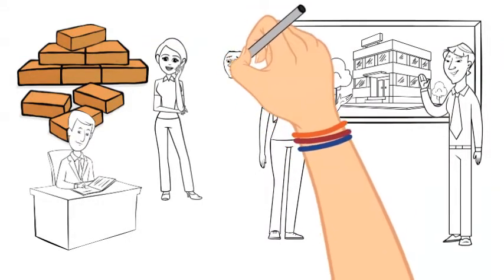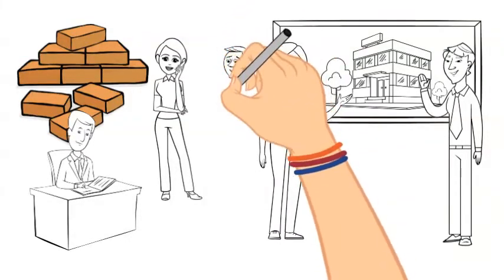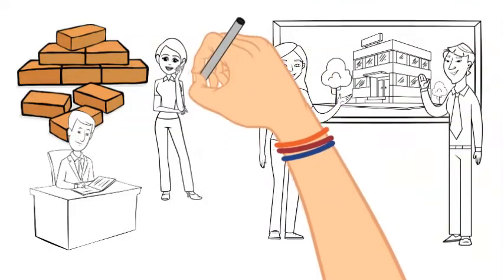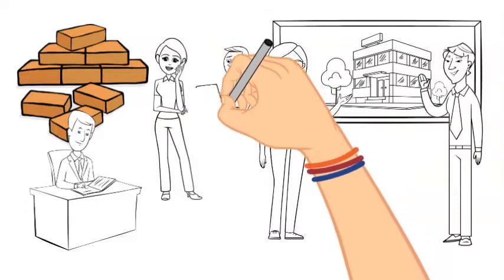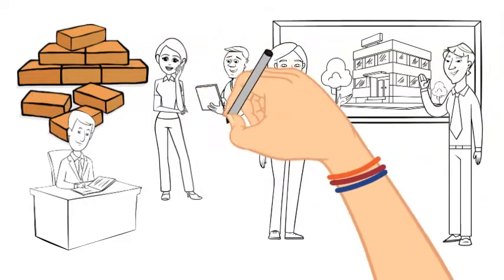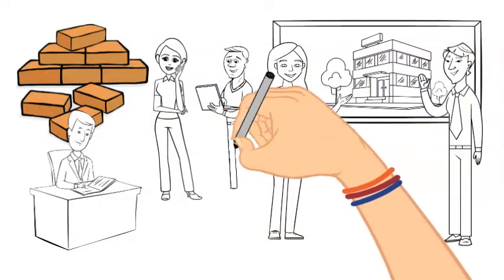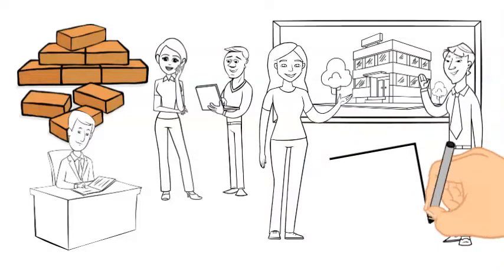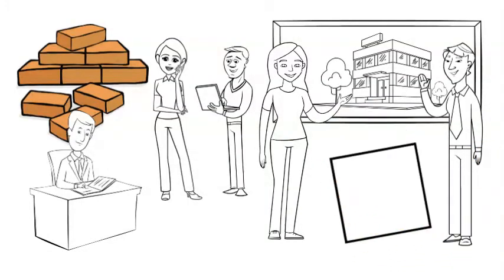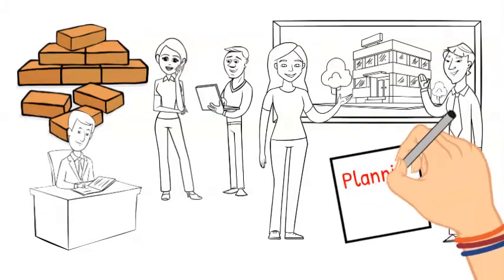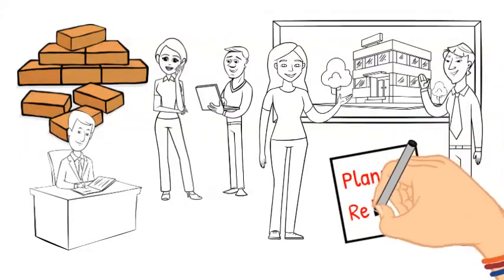Once we have a good idea of the materials we need, we can get the project planner involved. They'll start to produce charts about when these materials are going to arrive. But not just the materials, remember they've got to get the labour on site, they've got to make sure things like scaffolding and tower cranes arrive on time as well. And remember, throughout this process, the local planning authority need to approve the building. They may force some changes on our design team, and the client may change their requirements as well.